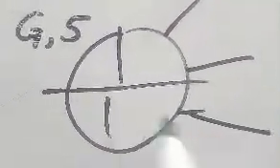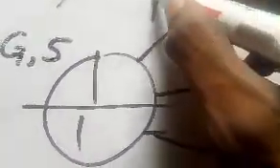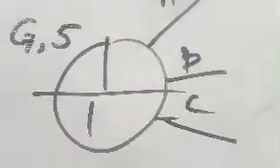So you can say you have your activity 1. Do you understand that? So you can say this is your A, your B, and your C. So that is the meaning when they say they are concurrent or they have predecessor as none. So you have your predecessor D as A, E as D, F as B, D. That means, example like this, I that has EH, it means what gave birth to event I is EH. That means EH must have been completed before your I can start. And that is your final test.